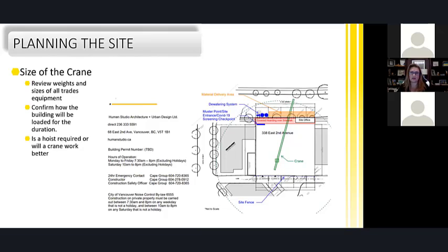Since then, we've done other projects where we didn't skin the entire building, so that actually slowed some of it down. It's not ideal, but it was a budget constraint and one of the things we needed to think about. The other thing is, if you're going to use a hoist, you need to have space for it, and you need to have access for it. And a hoist is no use for you if you're now in the space that you need to be in to be able to use it.